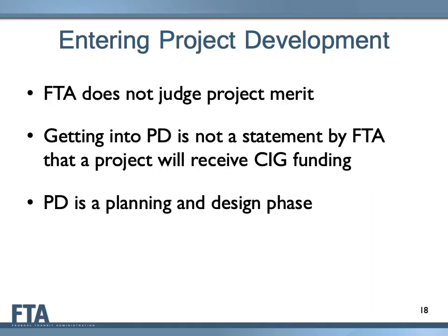It is important to remember that FTA does not evaluate and rate projects prior to allowing them to enter project development. Thus, entry into project development is not a statement of project merit or an indication that the project will receive CIG funding from FTA in the future. Rather, it simply means that planning and design for the project can continue by the project sponsor. FTA strongly discourages project sponsors from touting entry into project development as a major milestone to the press and other local decision makers, as doing so misconstrues the CIG process.